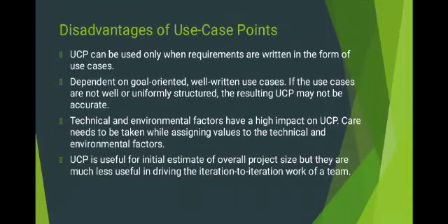Next are the disadvantages of use case points. Use case points can be used only when requirements are written in the form of use cases. It is dependent on goal-oriented, well-written use cases. If use cases are not well or uniformly structured, the resulting UCP may not be accurate.